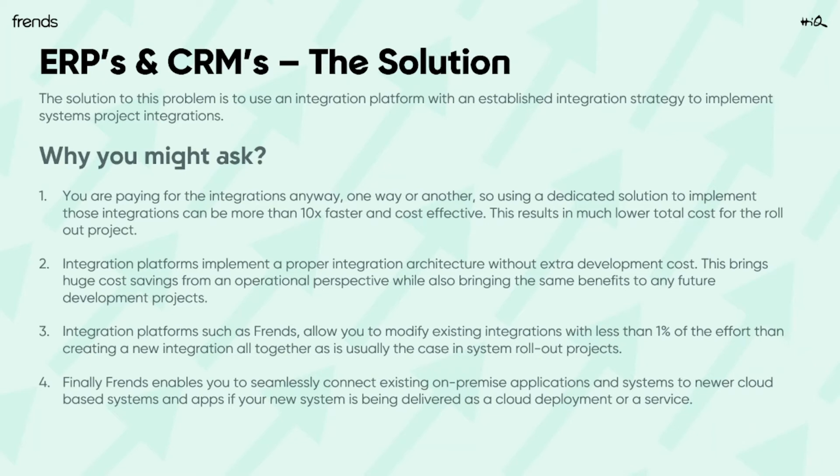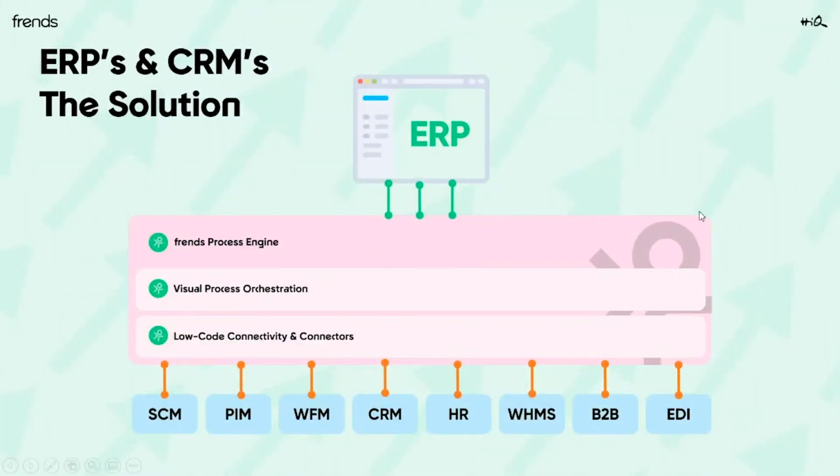And of course, there's a whole bunch of other key points that we could cover, such as using an integration solution like this to roll out the ERP, first implementing the integrations themselves and only the ERP afterwards. This allows us to have complete control over which system is transferred to target the new ERP instead of the old one, and we can set it up so that with a flick of a button, we make our warehouse management system migrate from the old ERP to the new ERP.